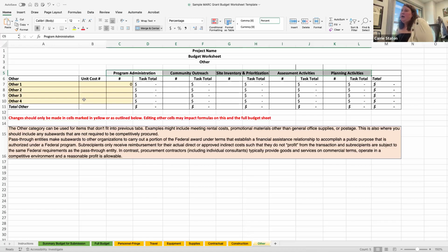You could do that. Some grantees that are smaller and haven't managed as many federal grants work with their area development district or local development district or regional planning development council to help administer their grant. So you might want to include some of that. But you want to make sure that it is something that would in fact be a subaward and not a contractor when you're budgeting for it and when you do your selection process. And again, that's something we can help with. We're not going to do any of that in this grant today, but it's definitely allowable.